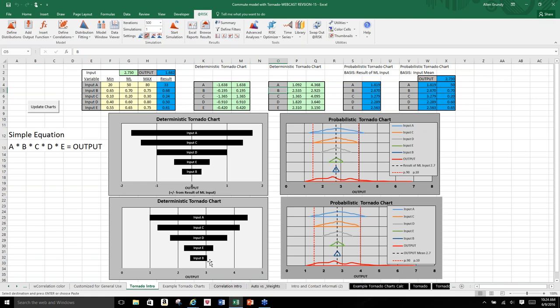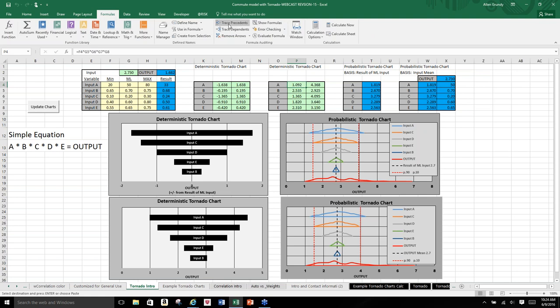Another way is to have that same information, instead of having plus or minus from the most likely, just to have the actual output along the bottom. And you can see how this is made pretty easily. Looking at these trace dependents here, this is the low end of the bar for input A, and it's the most likely input for all the other input variables except for A. It's at the low end. That's how you get the low end of the curve, and for the high end for that bar. So it's just deterministic and very easy to calculate